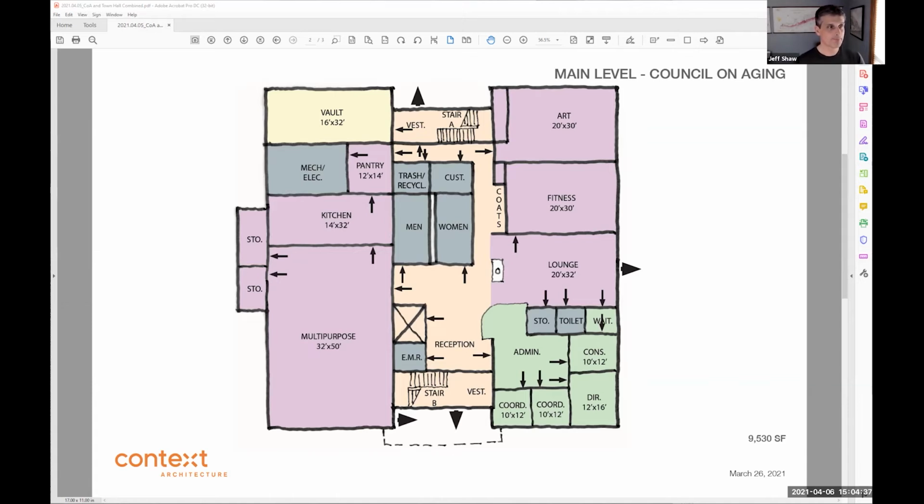Okay, good enough. And you indicated that this is the construction cost. I assume the current building would need to be demolished and removed. Do those construction costs include the demolition and removal of the old building? No, it does not. As you might imagine, it wouldn't take a whole lot to remove that building. So I don't expect a big cost for that, but it does not incorporate that. Okay. And when you say not a big cost, what's not a big cost? You're going to try to pin me down, huh? So I have no idea. It's not more than $100,000. It's not less than $10,000, but it's somewhere between the two.